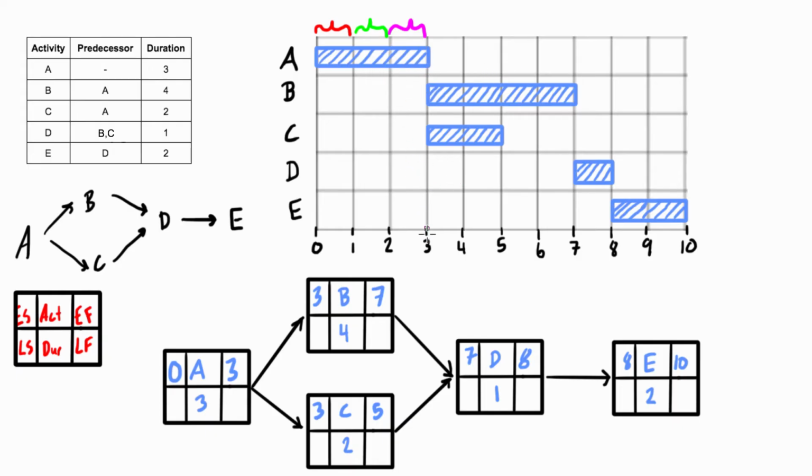But when we get down to the number 3 here, let's identify one more color. So orange will be our 4th day. So literally this number 3 is the end of day 3, but it's also the beginning of day 4. So when we get down into the network diagram, typically if you're just learning it and you're on rapid fire following instructions, what you do is you start with a 0 or 1 or whatever your professor or textbook tells you to do, and you add the duration, and now you get the early finish. And then someone will probably tell you, okay, take that early finish into the early start of the next activity, or the succeeding activities. So you're like, okay, great, I'll put the 3 here, and then boom, keep going.